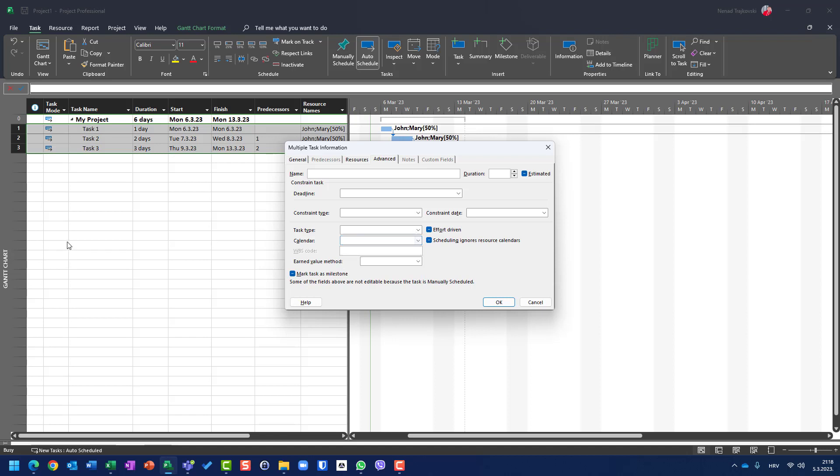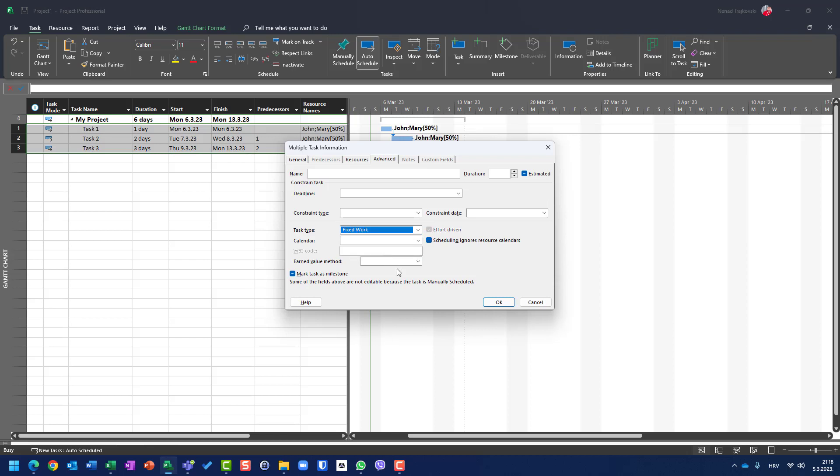But let's say that my tasks are, for example, fixed duration. And by default it is fixed units. I can go here and say I want to change task type for all tasks like fixed duration or fixed work. Let's say fixed work, for example. Fixed work. Okay.